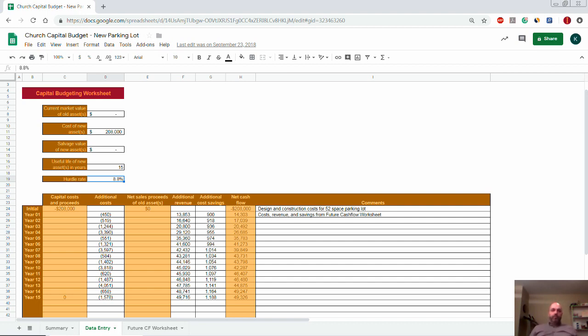So anyhow, hurdle rate. This is kind of the return on what you're spending, or the return that you need to clear in order for a project to make sense. Another example: say you had $1,000 and had the opportunity to invest it and get $1,050 in 10 years. Would you take that opportunity, or would you pass on it? You would probably pass, because that's 5% total over 10 years, or 0.5% per year, and that's just not a good return.